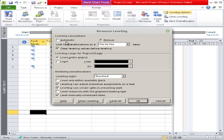Automatic means that whenever there is a problem of over-allocation, MS Project will automatically resolve it. Automatically resolving means the software will add some delay and adjust the dates accordingly. In manual mode, you will manually adjust the dates to resolve the over-allocation problem.